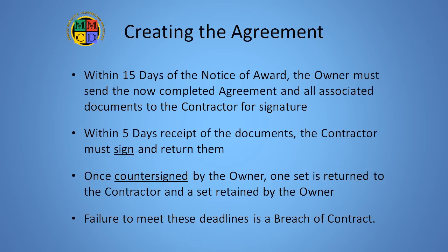Because there was an offer, that is the tender, and an acceptance, that is the notice of award, and a consideration exchanged, the bonds, a legally binding contract is now in place. However, to properly complete the process, the now filled-in agreement must be signed by both parties.